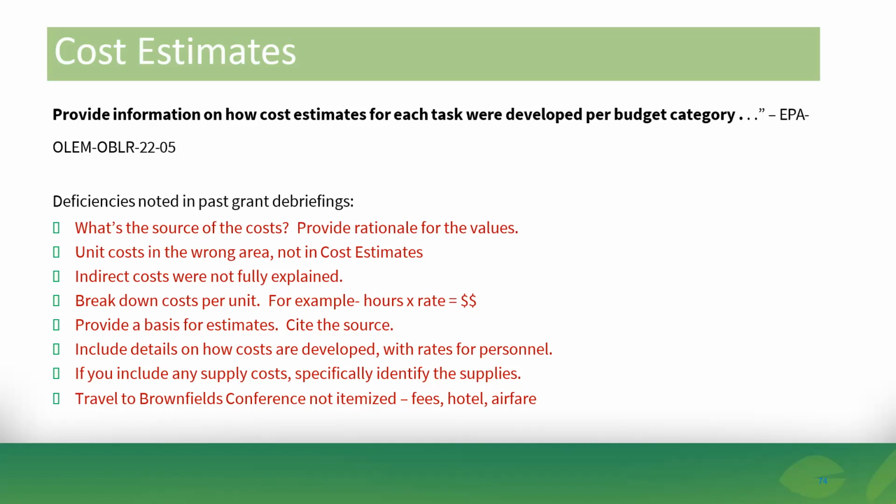Then phase twos typically are $10,000 to $35,000, depending on the size of the property. But then again, if you're looking to qualify the property for our voluntary action program, there's a lot more reporting and information needed. And those phase twos can exceed $30,000 to even over $100,000, depending on, again, the size of the property, how many sources or areas need to be evaluated.